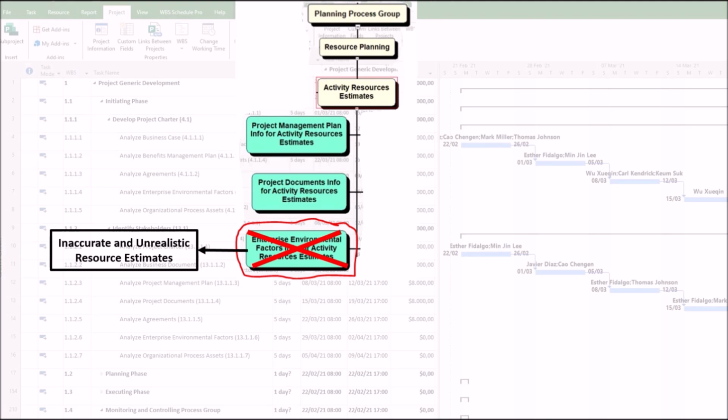This happens because your organization is already working on 3 other high-priority projects, and only 2 developers are actually available. As a result, you will experience an immediate and severe schedule slippage. The resource plan will be useless from day 1.